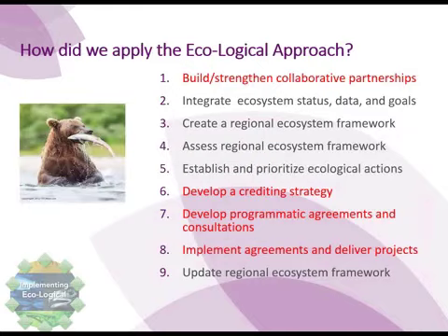And a lot of scrambling to figure out the quality of the habitat and whether fish were really present, whether we could do that or U.S. Fish and Wildlife and National Marine Fisheries had to do it. So the later these things occurred, pre-construction, the more of a risk we had to schedule and budget. So we looked to steps 1, 6, 7, and 8 as removing the proverbial dam of consultations.